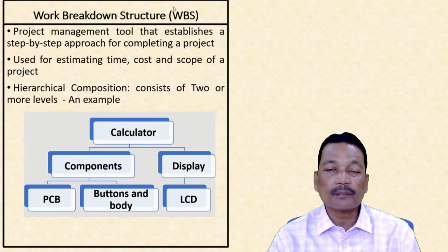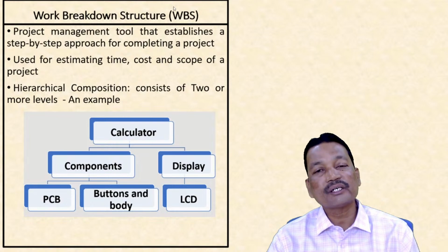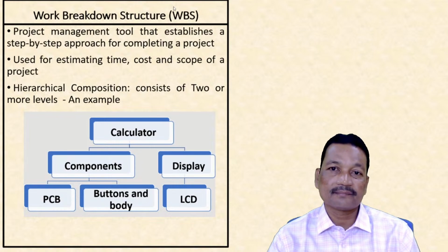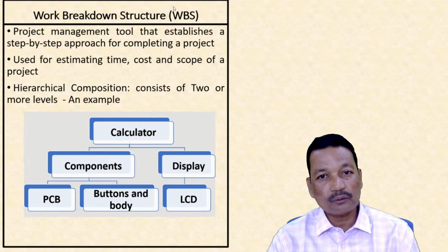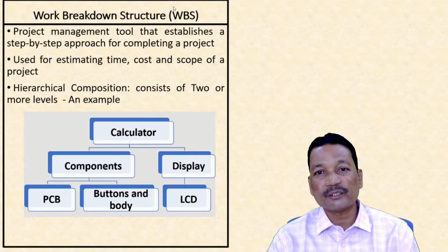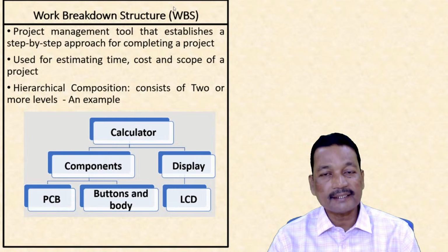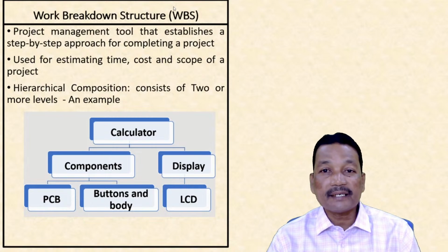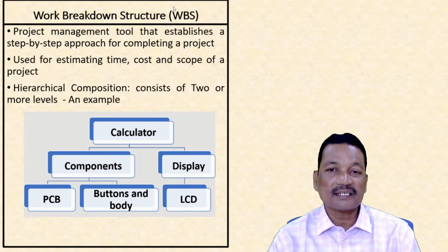Now, our project was a wooden writing table. What we have done is broken that down into three different components. One was the iron frame, the second one was the wooden board, the third one was the 10 screws used for a table. Now the writing table for one person, which is our main project, is subdivided into three types of activities which get together to give us the final item, that is the writing table.